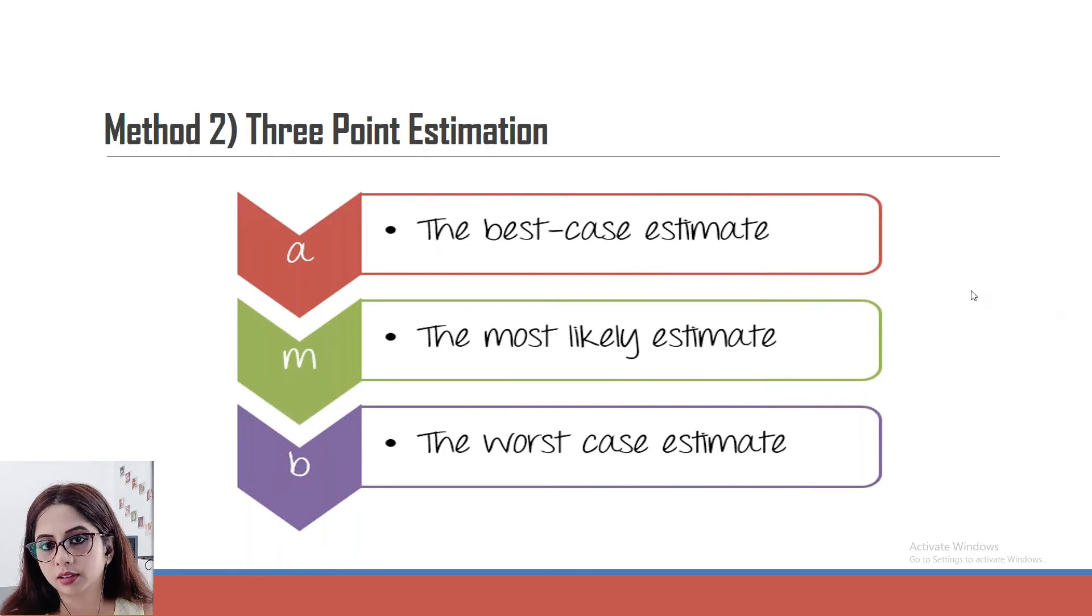But most likely you might take three hours. But in the worst case, if you get stuck in some piece of the code, you can also tell them that the worst case scenario, I may need five hours as well. So these are the three-point estimations you have to do so that there is an average of the efforts that can be calculated.